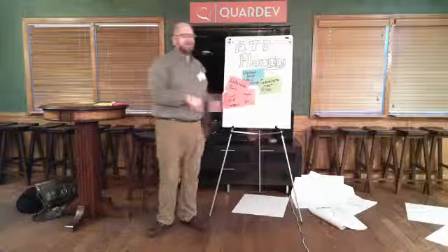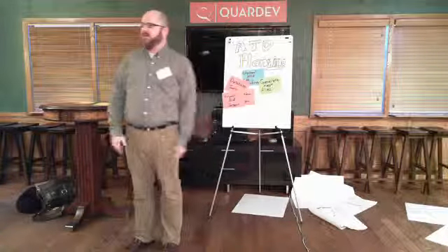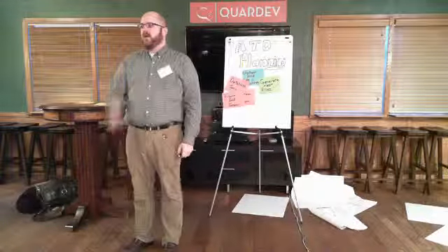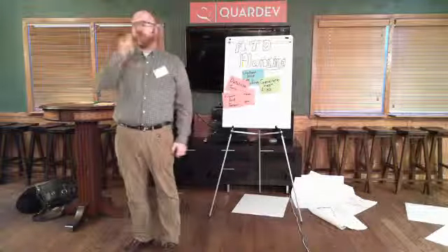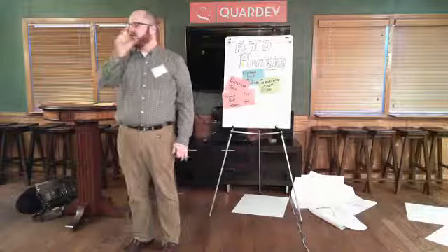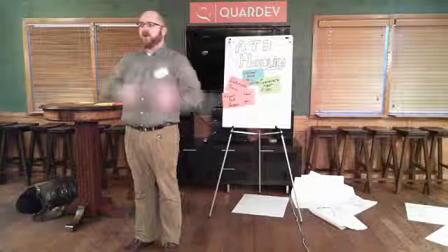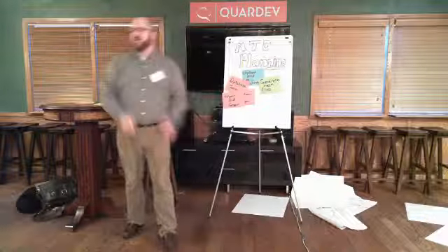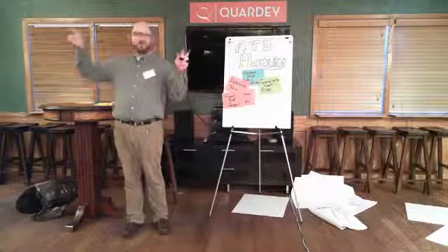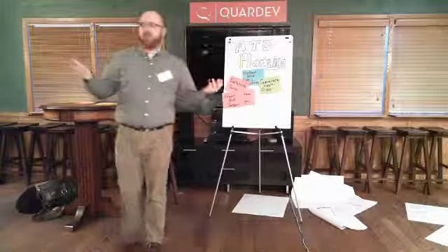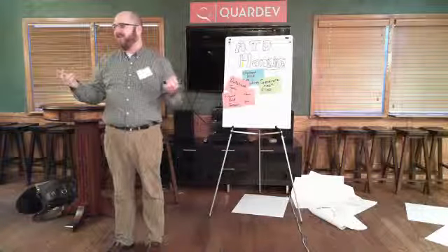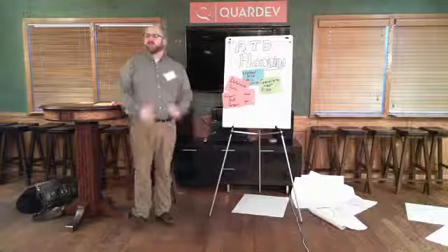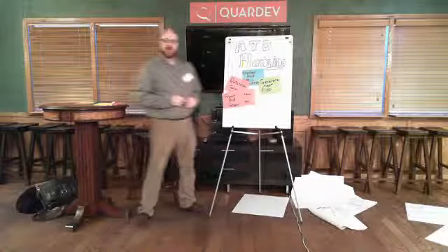The other thing on adoption that I want to give you is you don't have to do it for the whole sprint if you're in Scrum. You don't have to do it for every story in your Kanban backlog. Pick one and say, every other story in this sprint, we're going to do the old way, and we're going to do ATD on just this one. That takes your planning session from 4 hours to 1. You're going to learn to communicate with each other, and you'll get better at it. That lengthens the amount of time it takes you to be ATD by the book. But I'm not the Pope of Agile, so I'm not going to excommunicate you from the church. If that works for you and helps people dip their toe in it, that's another good tip. Long sidebar there, but good question.